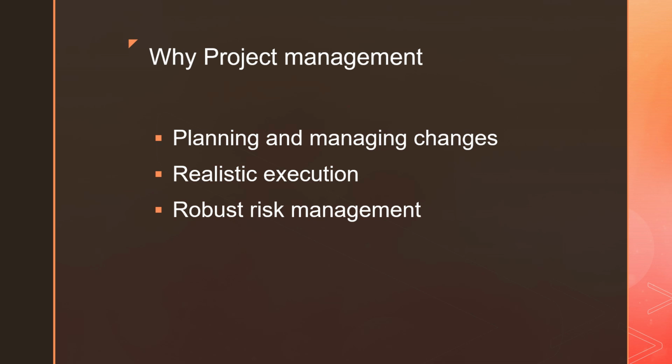We can classify projects into two heads, that is time constrained projects or resource constrained projects. Time constrained projects run on a reverse clock, that is, in time constrained projects time is fixed but the resource is variable. In resource constrained projects resource is fixed but the time is variable.